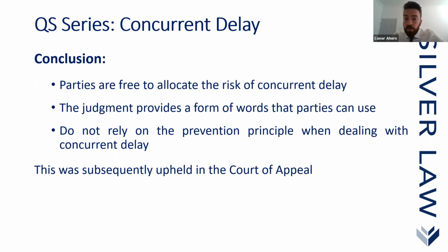When you are agreeing the relevant events and your extension of time provisions, bear in mind that if the position on concurrency has been amended, then this is what it means, and the contractor will not be entitled to his extension of time for the period of any concurrent delay where one of the delays has been caused by an employer risk event. Okay.